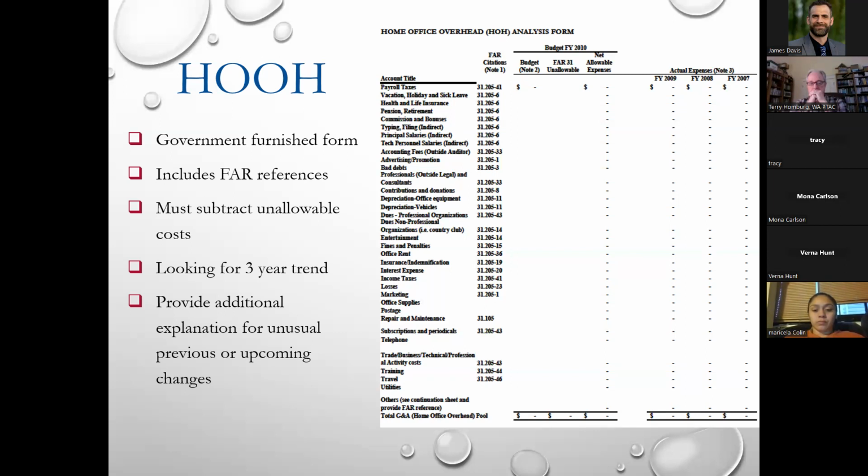If, however, you're doing a sole source, the government does not have adequate competition. They can call for a price proposal, meaning one price, when they have adequate competition. Adequate competition in the government's eyes is where they can expect 3 or more. Now, they don't always get 3 or more, but they can say, I can look at these 3 proposals and I can determine that this is the right price or a competitive price because I have adequate competition. I have $1,000 here, I have $1,200 here, and I have $1,500 here. I can see that they're all competitive and I don't need to see the individual breakdowns. And then they can make their award based on that. That is a price proposal.